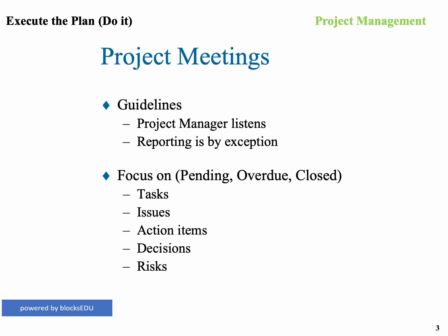Now, here are some guidelines about project meetings. Project meetings are a little bit different than normal meetings that you may have, so we're going to give you some keys and tips about how you should do that. First of all, the project manager listens. The project manager doesn't chair the actual meeting. The project manager should allow other members of the team to chair. It is very difficult to chair and run a meeting and listen.